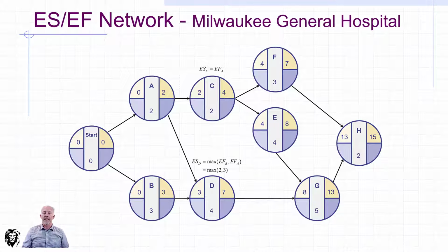At the end of the forward pass, we have the earliest start and earliest finish for all of our activities, including the time it's going to take to do the entire project, if everything goes off as planned.